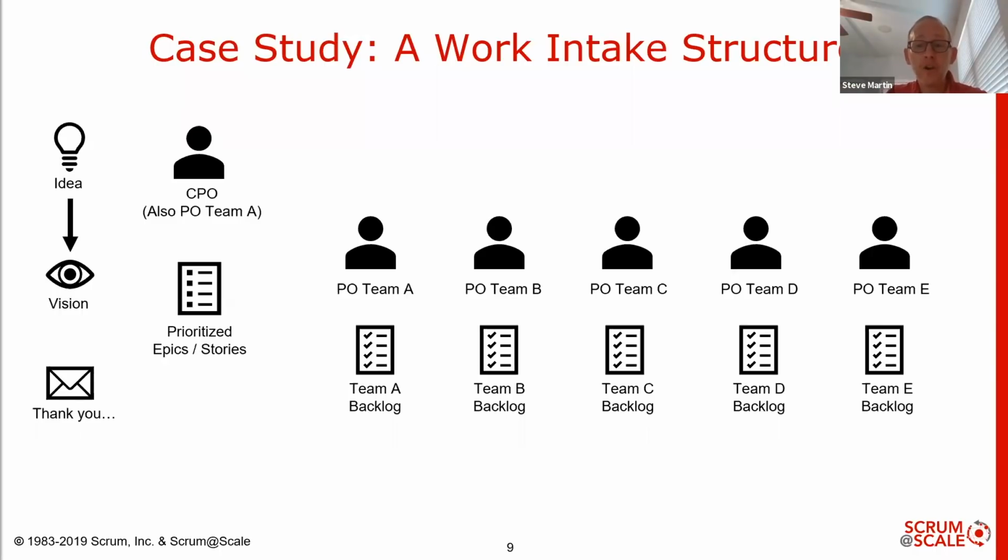Now, this is despite all the requests that were coming in, typically flagged as mandatory or the hot item to work on. Now, in this new model, what we did is we descaled. We restructured the intake flow as well as some of the roles and responsibilities. So as ideas came in, a chief product owner looked at the request and compared it with the organization's vision, which really wasn't defined in the past.